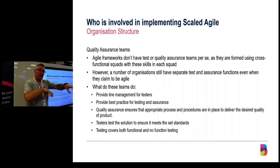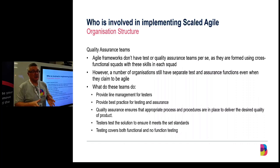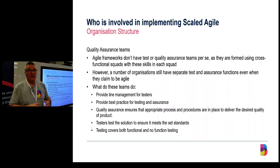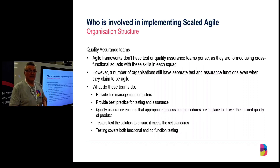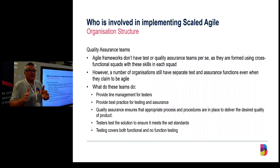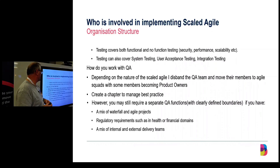If you have a lot of third-party products, someone's got to test those elements and deliveries, and you need system-level testing, customer testing, user acceptance testing — these aren't typically squad activities. You might still need that function. QA teams also do wonderful things like performance testing, scalability testing, accessibility testing — things where you might not have enough experts to fit in each squad or where there isn't enough work in a single squad. Look at your structure, look at what you're trying to deliver, and be flexible.